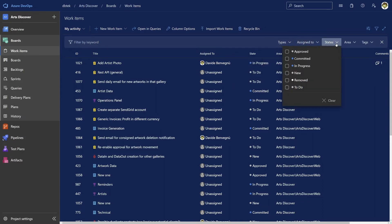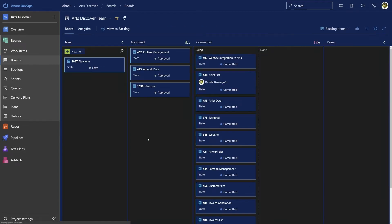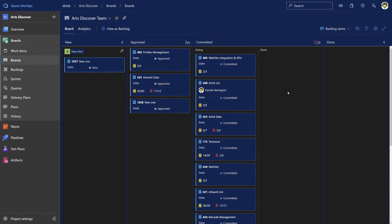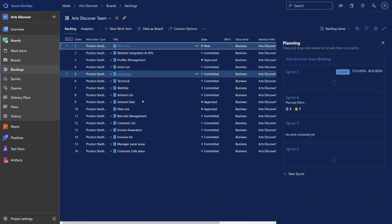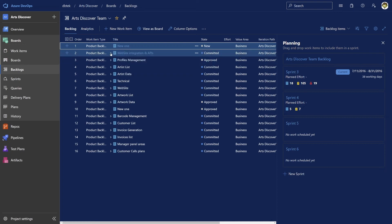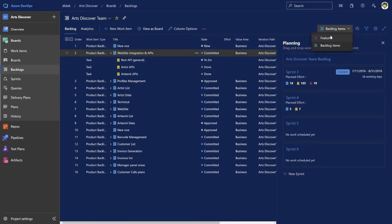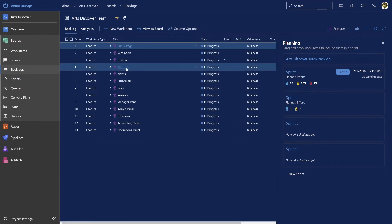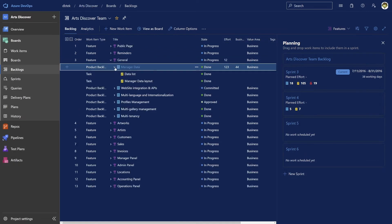Backlogs and boards are strictly correlated, in the sense that they show the same work items but in a different representation. Boards show epics, features, and backlog items in Scrum, or user stories if you're using the Agile template, in a Kanban-style view, while backlogs shows the same but in a hierarchical list that allows you to navigate the dependencies between the work items, even down to the tasks and bugs.